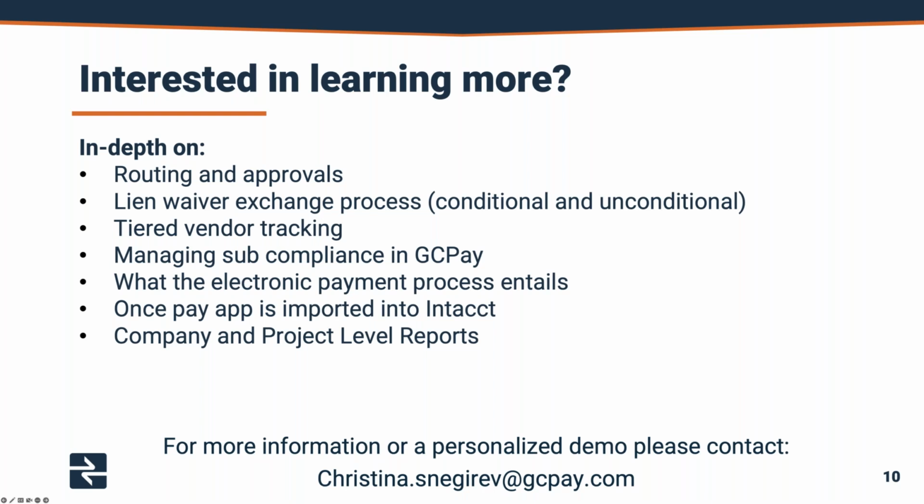But yes, we have the ability to create the owner SOV, and then we can map all of your sub billings against that owner SOV. So when you're ready to create that owner invoice, we can automatically generate all of those sub billings onto the owner invoice.